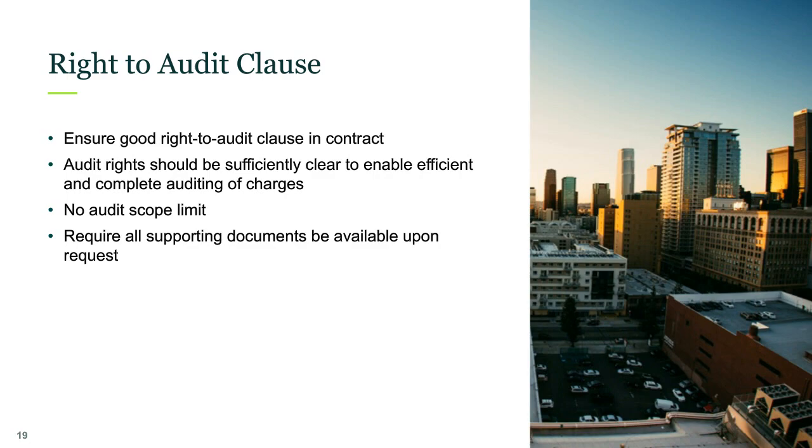Moving on to the right to audit clause. Now that you have your projects in mind, I think this is a great place to start, and it's to ensure that you have the right to audit clause. The right to audit clause is a great starting point to mitigate project and program risks. Knowing your costs and ensuring the cost is compliant with the contract terms is essential to prevent excessive charges. Timely and adequate review of project cost documentation can prevent overcharges and help manage total program and budgets.